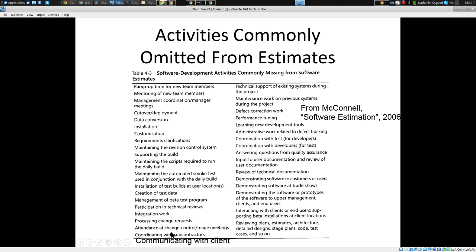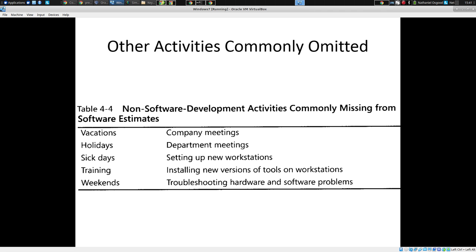Yeah, Will. I'd also say that one of the major ones in a lot of projects that have a lot of different moving pieces with their own estimates is not accounting for other people's estimates being inaccurate. Because a lot of the time, you have an estimate that's right, and then it keeps getting pushed back, and then your thing keeps getting pushed back, and something else gets pushed back. That's right. And it's a cascade effect. My estimates are built on your estimates, and your estimates may be over-optimistic in part because you're counting on someone else's, and so it ripples through. Very good point. These sort of systems effects are quite pervasive.